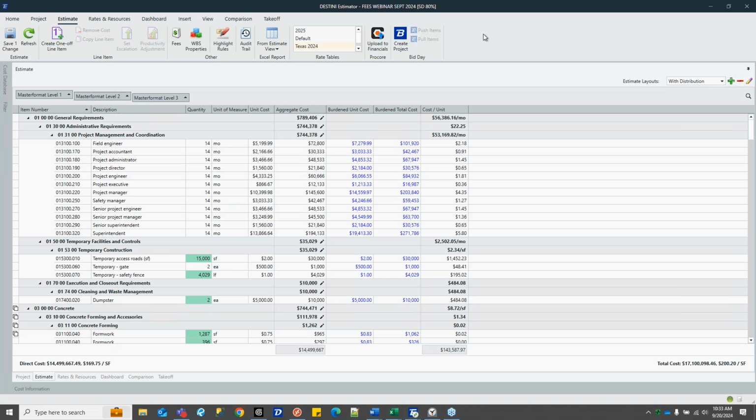The other thing to keep in mind is that your fee table is a critical part of any estimate template. And it's actually the catalyst for most groups making their first organically homegrown templates post-implementation. A public job, a P3 job, and a private job are going to have different funding structures and different fee requirements, let alone what the impact of a different market sector might bring. So it is totally normal and can be significant time savings and risk reduction to have standardized fee tables for different market sectors, different funding structures as part of your estimate template library.